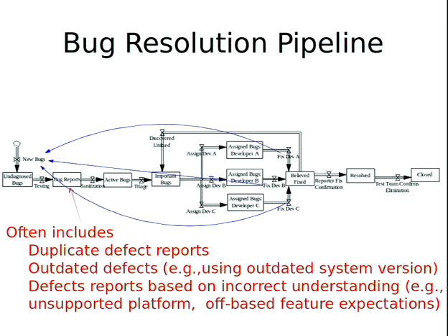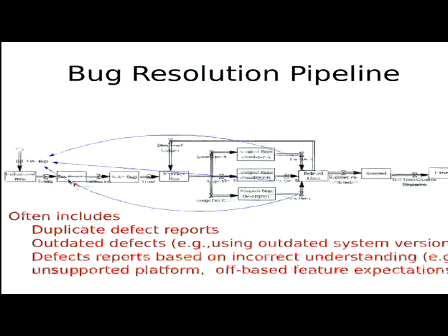Undiagnosed bugs over here on the left-hand side. And these bugs, through a process of testing or peer review or other aspects of quality assurance, go on and become bug reports. And then through a process of sanitization, they go on and become active bugs. I need you to understand these terms. Sanitization involves basically checking if these are truly a new distinct bug.